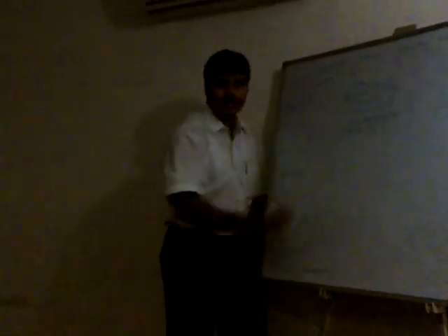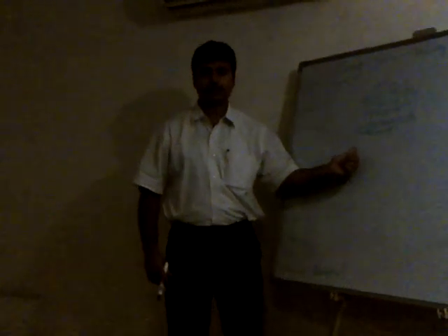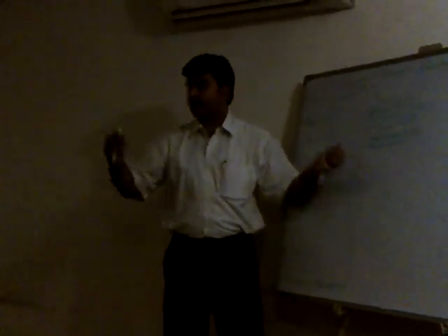Your scope baseline, excellent. Is it clear why it is the scope baseline? Yes. Clear? Because in the scope baseline you have the WBS. In your WBS you have the lowest level, which is your work package. So you need to identify the activities which you need to perform in order to reach that lowest level deliverable. So you get your activity list, activity attributes, milestone list, fed as an input to the next process of sequence activities. You come out with your project schedule network diagram.